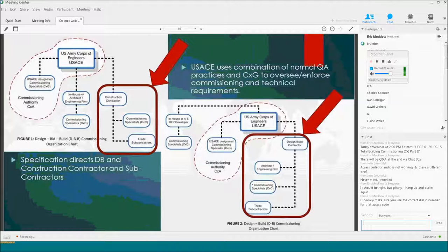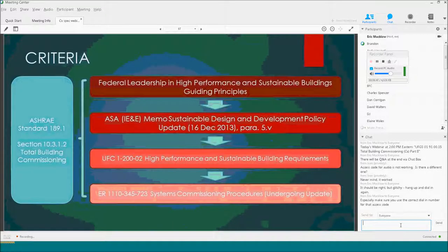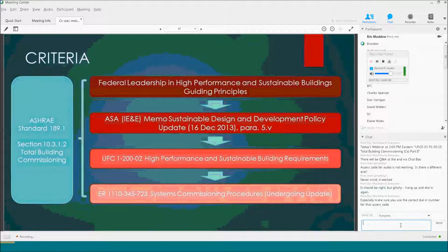In both Design-Build and Design-Bid-Build, the Core provides oversight, so we should have a commissioning specialist on our side helping to provide some level of QA of that activity. All of this stems from the high-performance and sustainable building guiding principles, but the hard requirements are in the Army Policy Memo from 2013. In UFC 1202, they point to ASHRAE 189.1 and conform to those commissioning requirements. The engineering regulation on systems commissioning procedures, published in the 90s, is being updated to incorporate newer requirements.